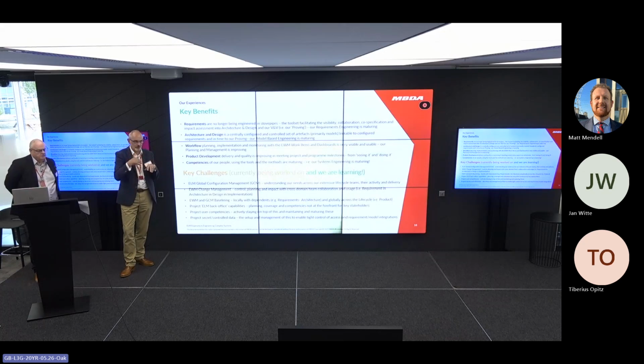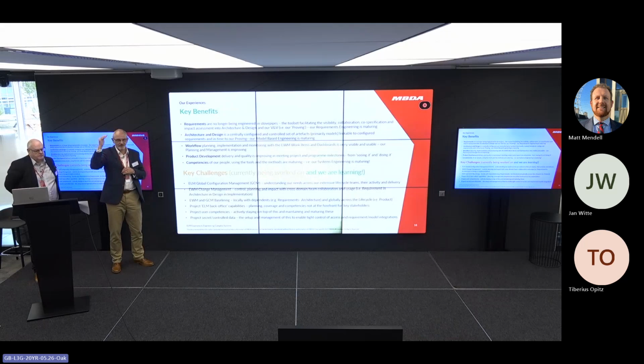So what we've said on the project I'm on, in terms of the major program project deliverables and milestones, it's all in P6, because that's what the very, very senior people see and the customer sees to some extent. But it gets to a point where it's too low level detail for them, but we need that next level of detail. So we're sort of linking.